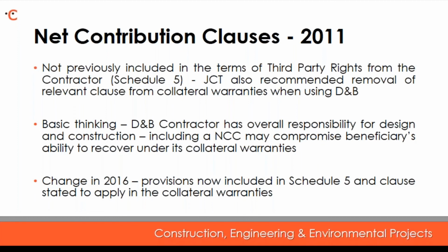So with specific reference to the design and build contract, the basic thinking behind this was that, as many of you'll know, a design and build contractor has overall responsibility for design and construction of the project. So the inclusion of a net contribution clause might in fact compromise a beneficiary's ability to recover under its collateral warranties.